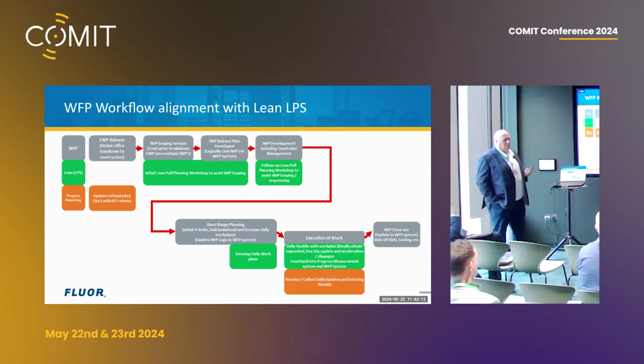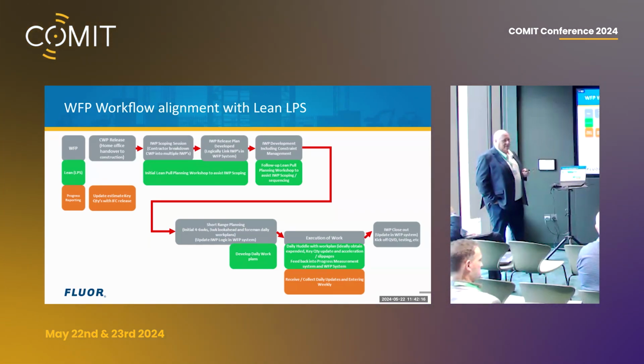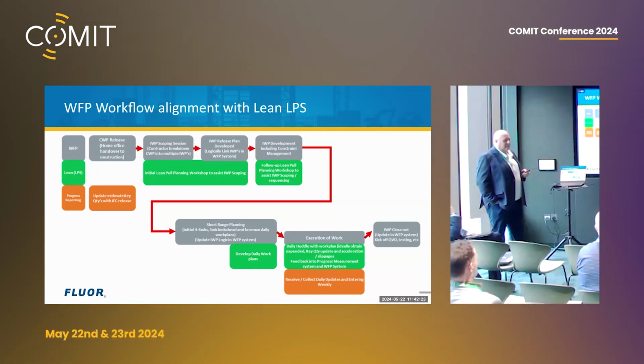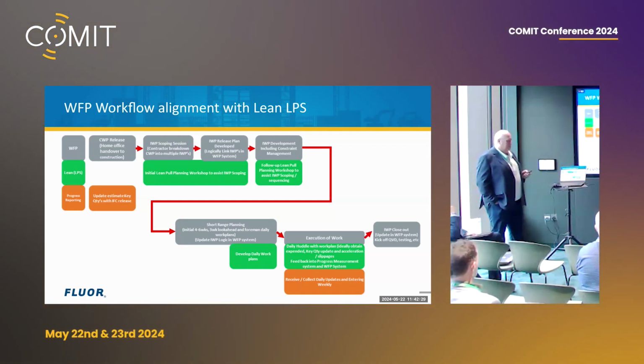We've installed whatever we've installed. Have you done your checks on it? How far are we ready for, say, hydro testing or electrical loop checks? Are we ready? Are we not? Are there more tasks to happen? So that's really the kicker driving into commissioning from that point onwards. Are we ready?